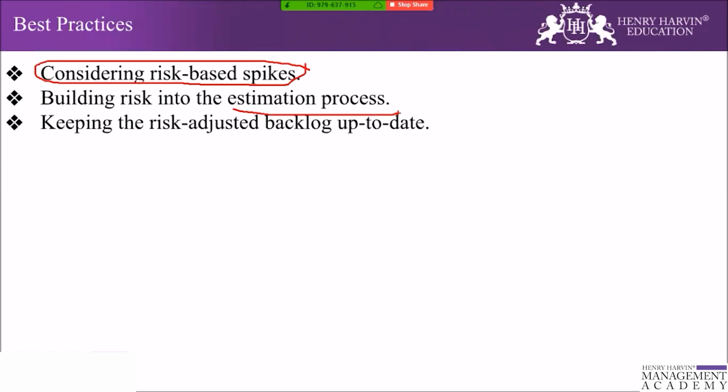For example, if three team members rate a story as 8 story points, another team member might point out that if there are problems with the scheduled upgrade, the story could easily be 20 story points. This conversation would prompt additional discussion as to how the team can prevent the story from being 20 points, generating potential risk response tasks for the backlog.